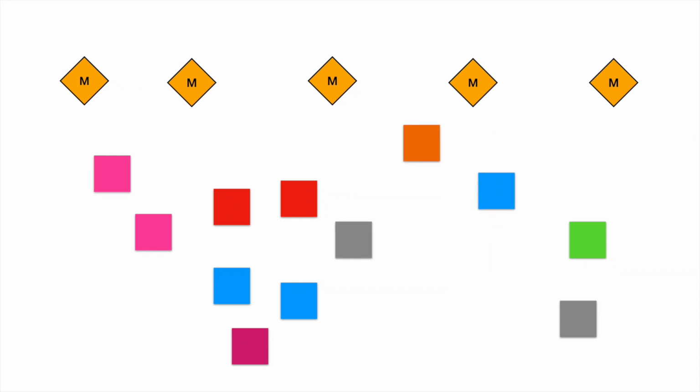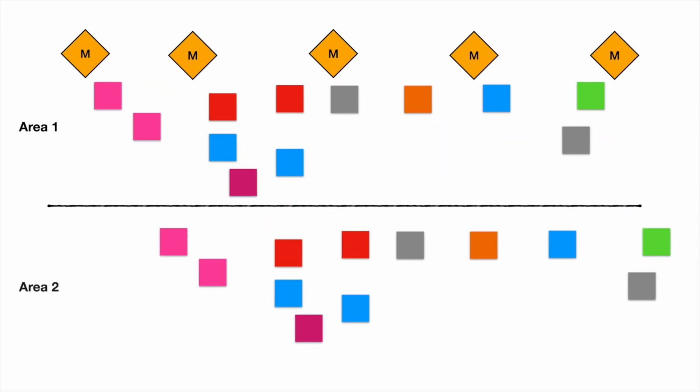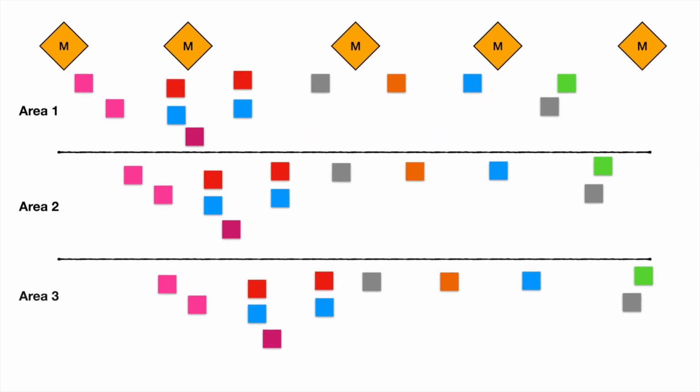However, most work is much more complicated than that. There might be multiple buildings or floors or phases of work, areas of work, design work, and construction work happening at the same time that you need a plan. This is where adding complexity with swim lanes can help you visualize the plan. A swim lane allows you to separate tags into different horizontal areas that show concurrent paths, especially if work from multiple swim lanes share the same milestone, or when something from one swim lane releases work in another swim lane.